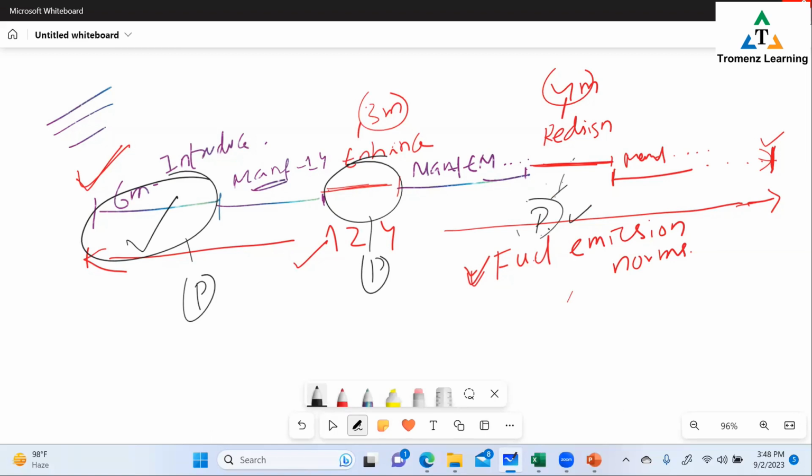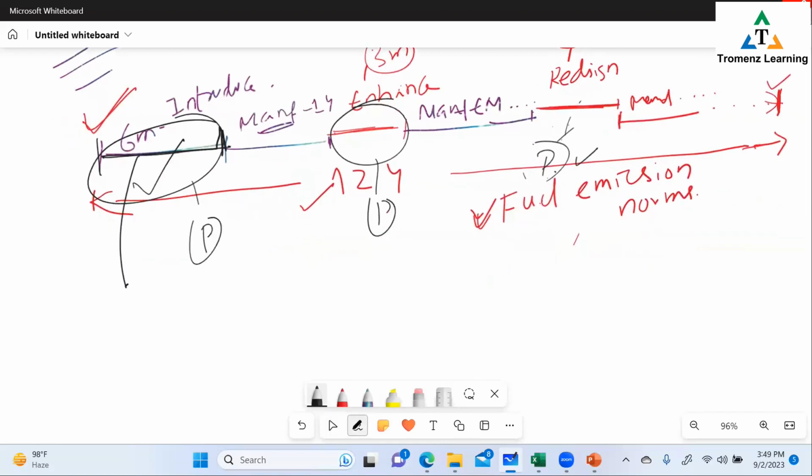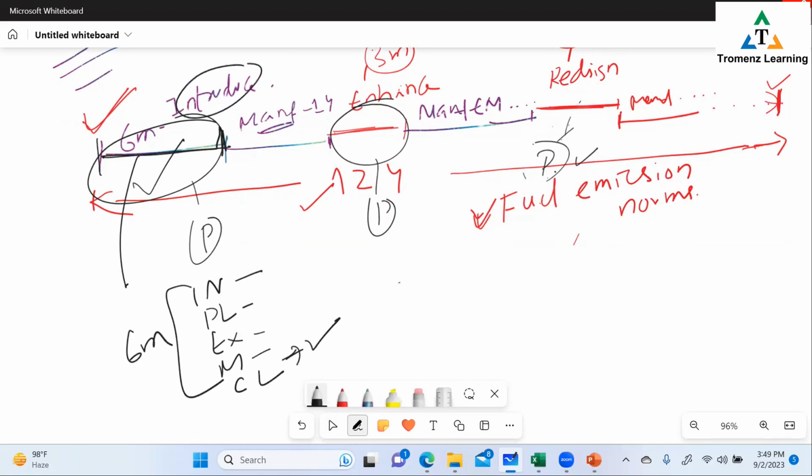So let's talk about the first project, the 6 months project that I take to come up with a new model. The project lifecycle of this project is confined to 6 months. Within this 6 months, as somebody already answered, you're going to initiate this project, plan it, execute, monitor, and close it. All of it happening within 6 months. Closure is with the introduction of the new model. This is my project lifecycle. So from initiation through closure is project lifecycle, while product lifecycle is vast. I hope we have clarity on this.